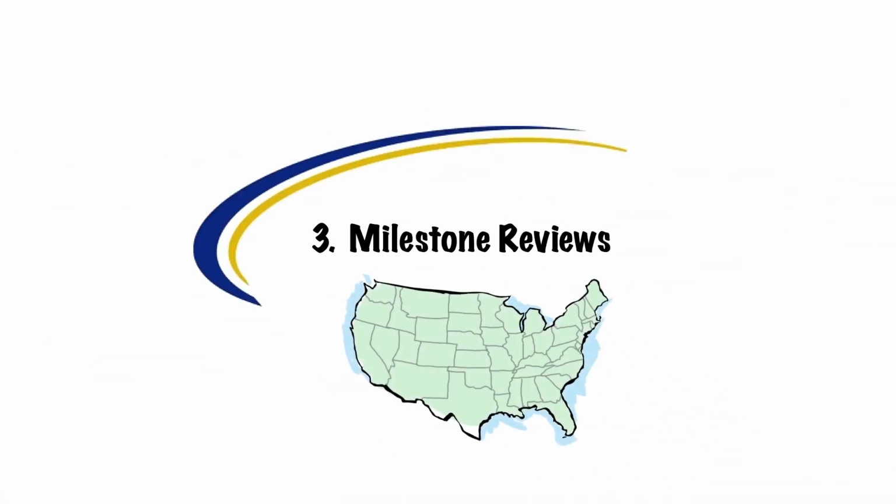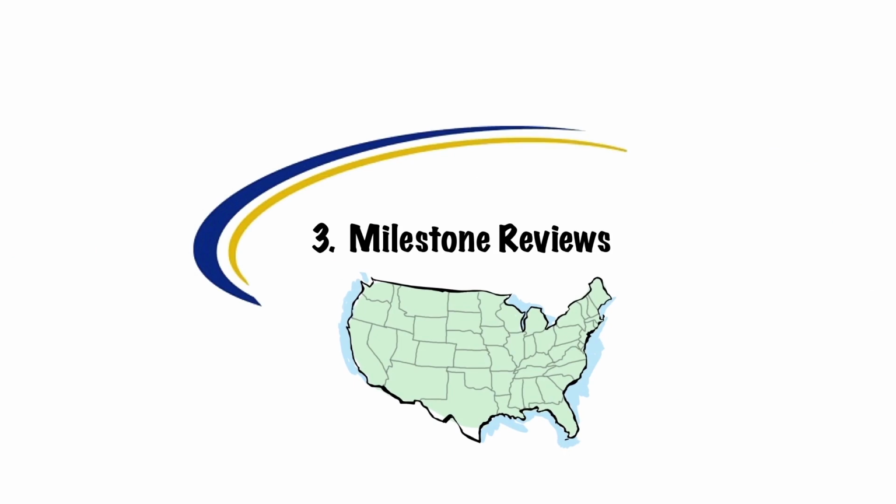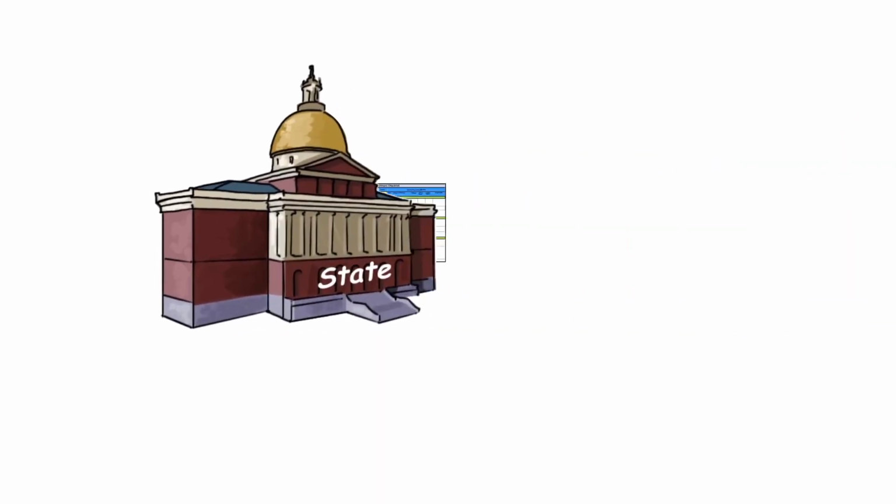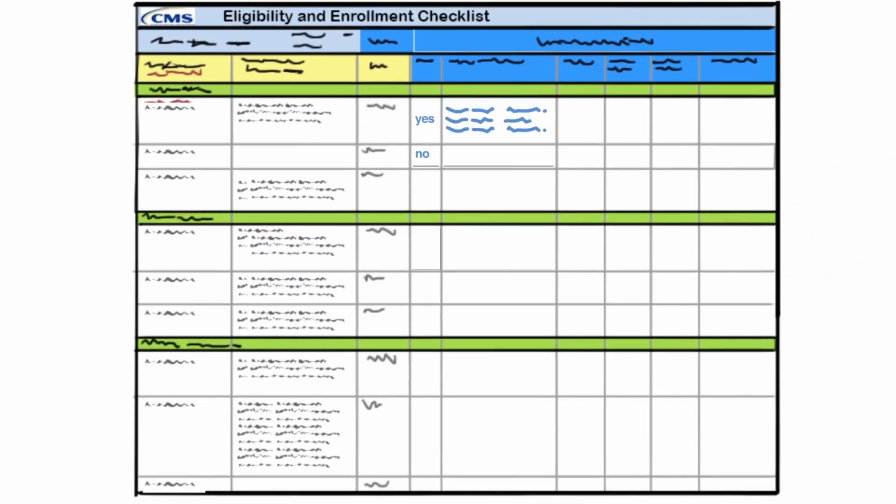We'll now examine how states can prepare for milestone reviews. To prepare for a milestone review, the state fills out the state portions of the checklists that apply to the systems undergoing the milestone review. The technical architecture, information architecture, and standards and conditions checklists must be used. The state stores the checklists and supporting evidence in its own repository.